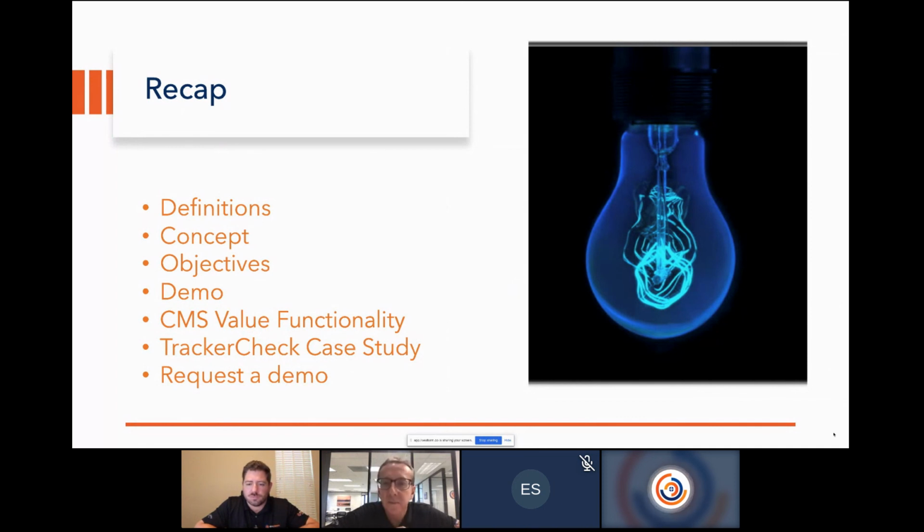Yes, so that's baked into the system too. One of the tabs underneath punch list is preservation. So we have a simplified preservation module built into this, and it's a very, very streamlined version of our tracker run system. So you can assign PMRs, we call them preventative maintenance records, to a particular tag, put it on a schedule, say it repeats weekly for motor rotations, monthly or dailies, whatever schedule you need, and it just automates and generates as you go, and you print them out, sign them off just like you would the ITRs. They come out with QR codes on them as well.